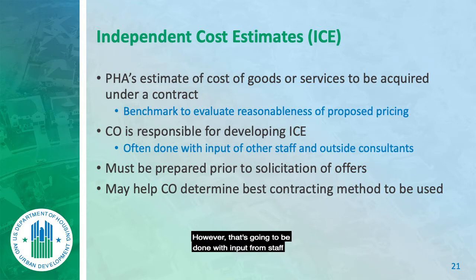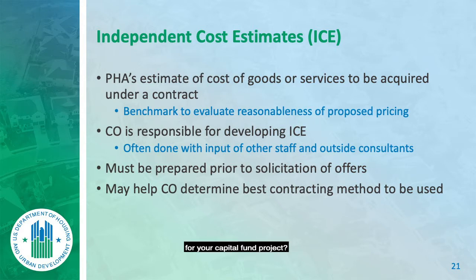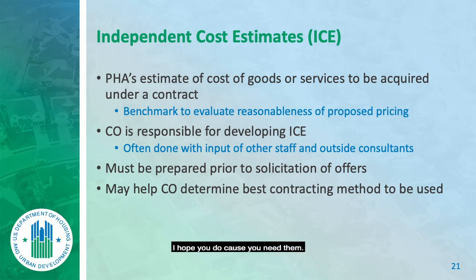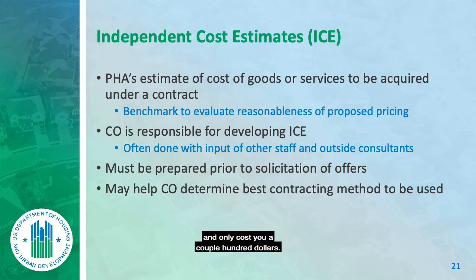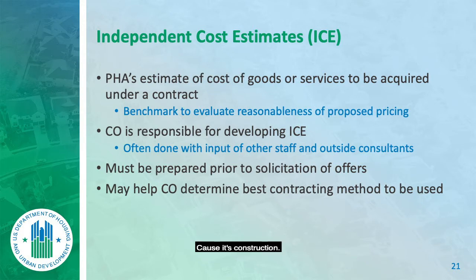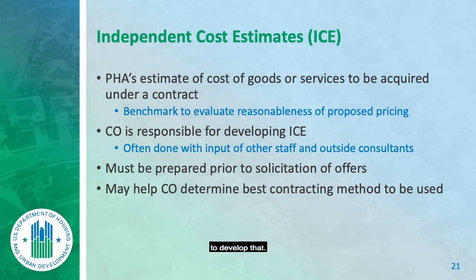The contracting officer is responsible for developing the ICE, though that will be done with input from staff and sometimes other consultants. For capital fund projects, architects can do the ICE for you and it only costs a couple hundred dollars. You take what they provide for that project and list it in the form — usually capital fund will be a firm fixed fee because it's construction, but it's very appropriate to use the architect to develop the ICE.